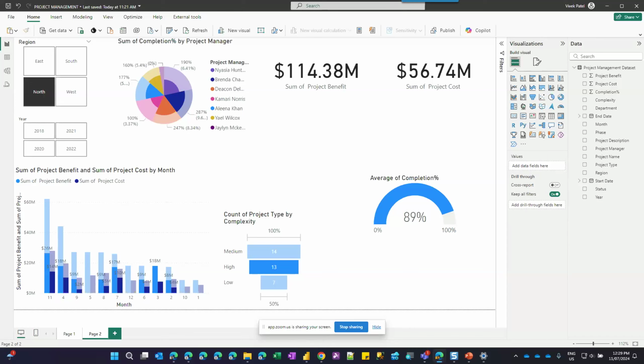Yeah, so I will start by saying that your reporting could be as simple as my task list. How many completed, how many are in a project. I just want to track the late tasks, so start time and end time are there, and if today's date is past the end time, then I'm late.